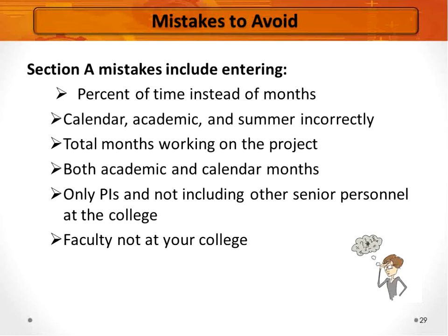I see another one where it says basically how many months can you request. The grant proposal guide, which is something hopefully all of you either have read or will read, has some specific language on how much time you can request to be compensated for. And the grant proposal guide actually says that the maximum for any National Science Foundation proposal coming in is 2 summer months of support. A solicitation, though, can trump the grant proposal guide, and the ATE solicitation does allow you to request additional time.